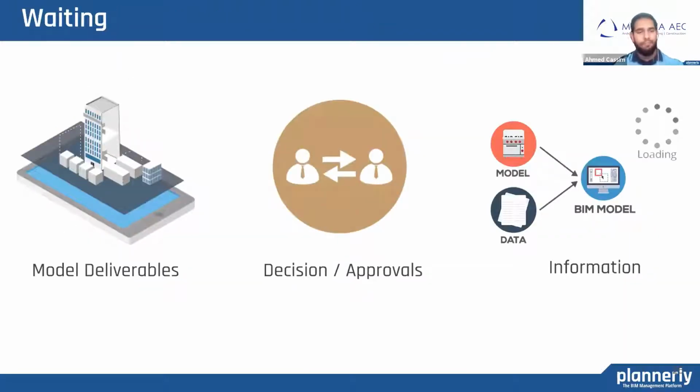Another is waiting, whether it be for model deliverables. If you're waiting for something to do your work, or waiting for people to make decisions, especially those who are not part of the initial planning process, or the hardware that you're using isn't powerful enough to handle, for example, a large model, you could end up with a lot of waste in time. We also see waste.